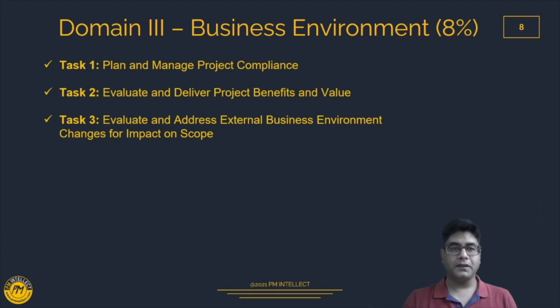So identify. Second step is to assess and analyze as well as prioritize. Third one is to identify the solution based on the changes. Fourth one is to implement the solution and ensure that we are back on track, or do a course correction in our planning. And the last one is to keep checking in case there are any further changes coming which are going to impact our projects.